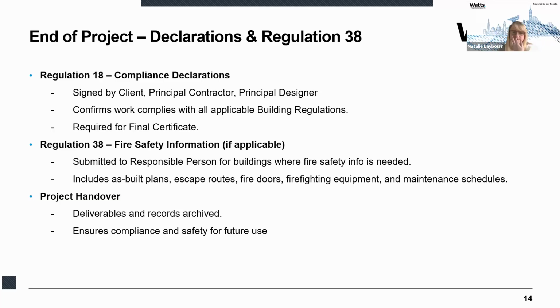Now, this information must be provided no later than the date of completion or occupation of the building, whichever is earlier. And the responsible person must then acknowledge receipt and confirm that the information is sufficient to understand, operate and maintain the building fire safety systems.